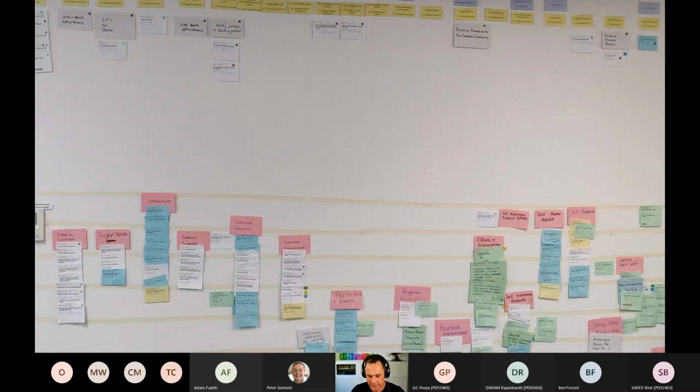This second example is another physical user story map. This is from RACQ, which was a project I worked on over the last couple of years. And we had this massive big wall in a conference room with lots of notes and cards stuck on the wall. So at the very top in the right-hand corner, you can probably just see a couple of purple cards. That's the level 2 business processes. Just underneath that in yellow are the business process activities, the level 3. Underneath that in white are the epics. And then as we schedule those into sprints, so we're not just using releases, but actually which sprint are we going to deliver the work in, those begin to get delivered towards the bottom half of this wall.